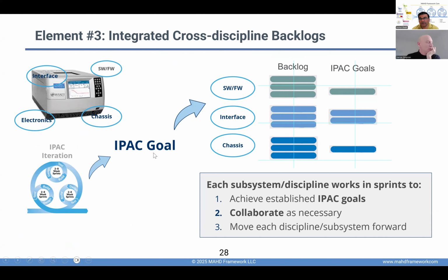The next area of modification that we want to talk about today is going to be the backlog itself. For software, the backlog is often just a long list of prioritized features and technical stories, in the format that a lot of people are aware. The product owner will typically take care of prioritizing them, managing them, setting the acceptance criteria. Now, as you can imagine, that's not going to work for hardware. It's going to be impossible for a single person or product owner to own the entire backlog across multiple disciplines.